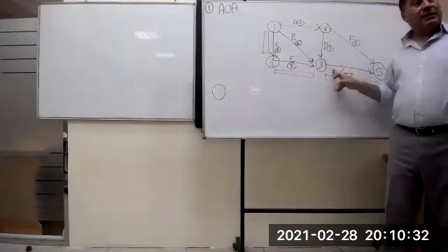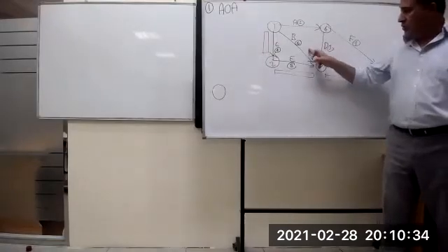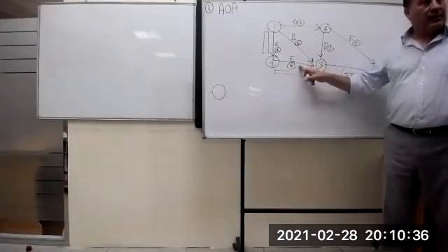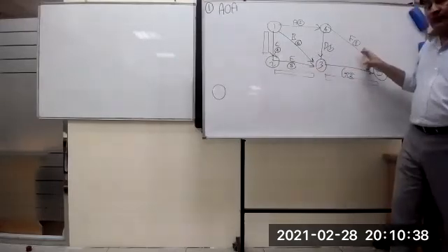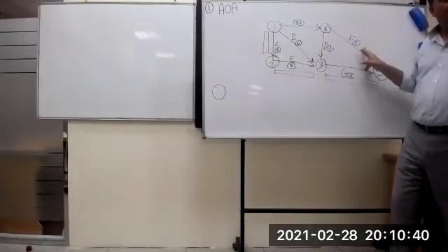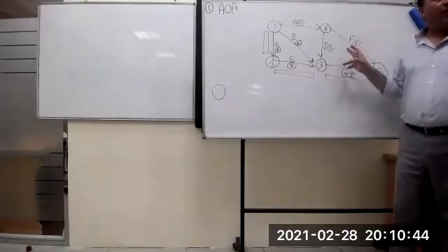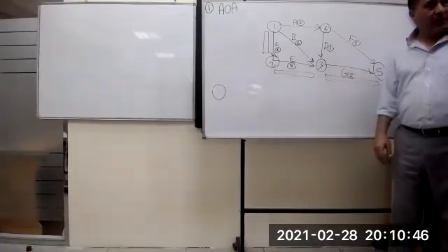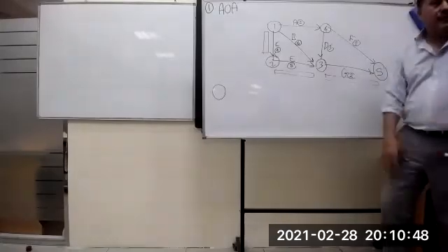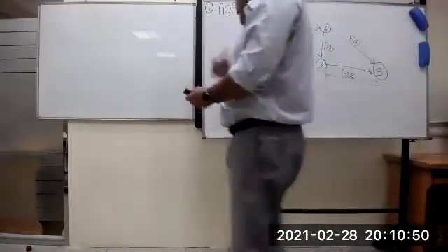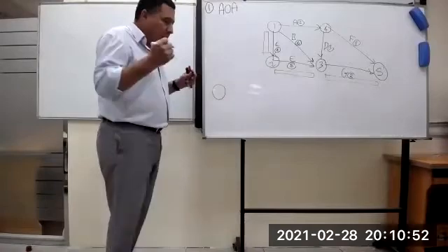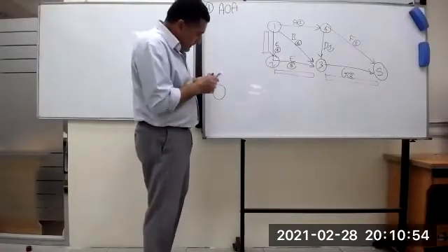G, how many predecessors? 3: 1, 2, 3. Correct? But is there any relationship between G and F? No. We call it an open-end activity. I have to link it with the end. Let me give you another simple network with questions.